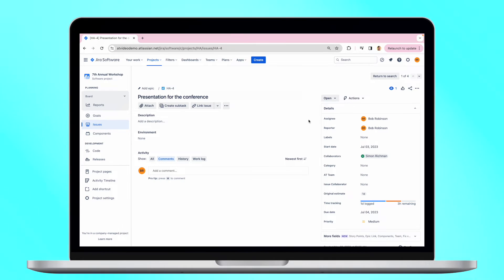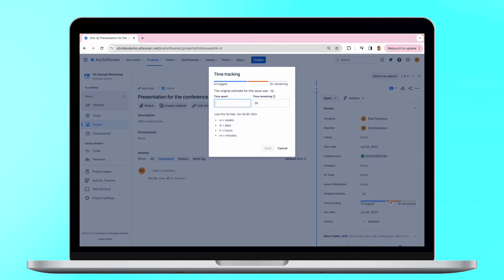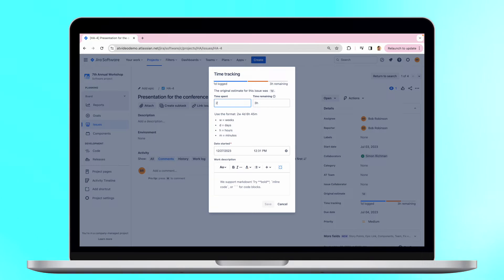Users can log their work time with the help of the Jira time tracking fields. Just find the needed task, fill in your worked hours and save.